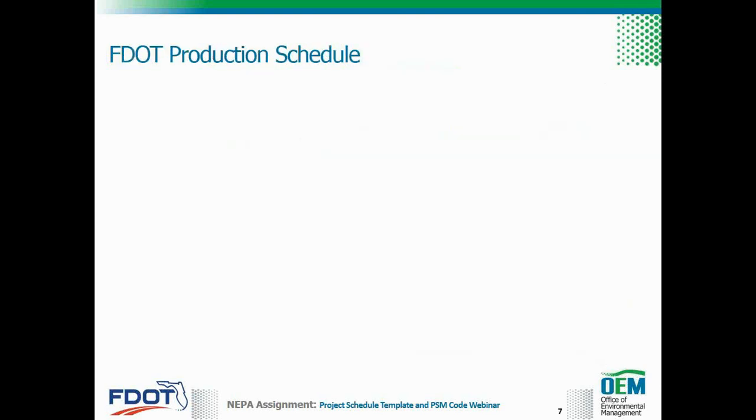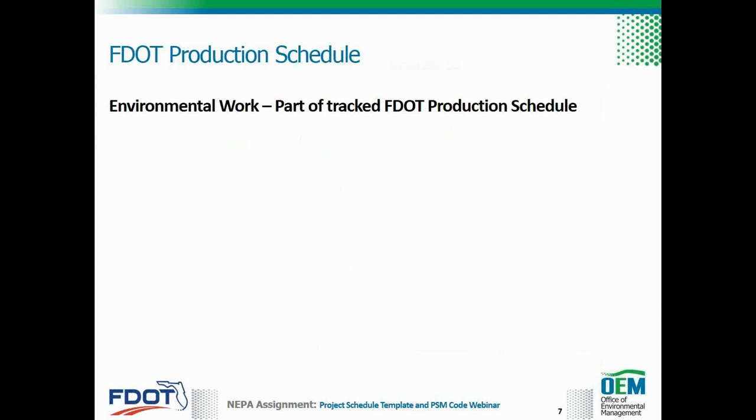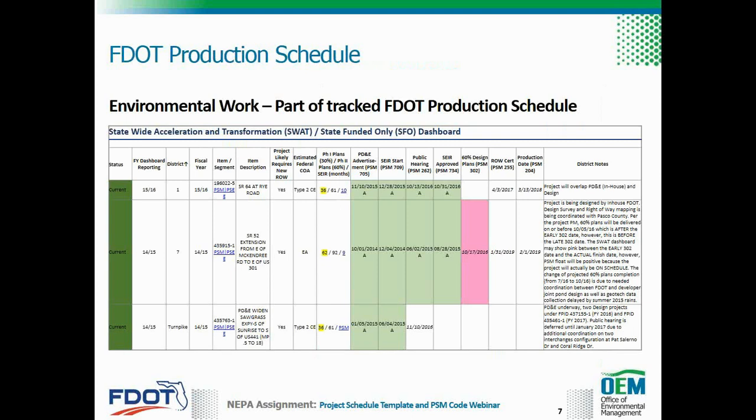So the next question is, why are we talking about PSM codes, and why are you attending this webinar on PSM codes in November of 2016? The main reason is that FDOT management has decided that environmental work will now be part of the track production schedule. And by environmental work, I'm referring to PD&E activities and also to pre-PD&E activities. As part of this effort, FDOT will be developing a dashboard for state-funded and federally funded projects.